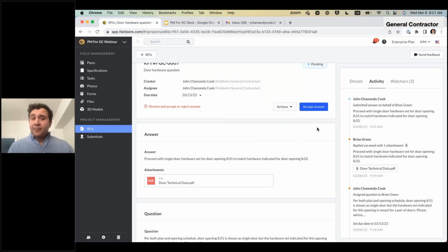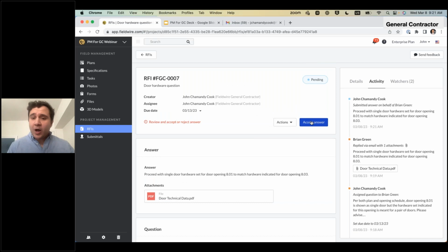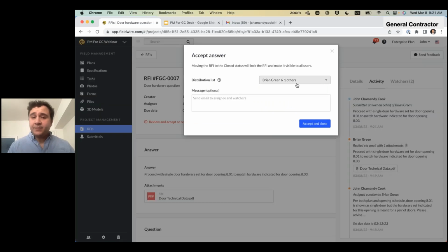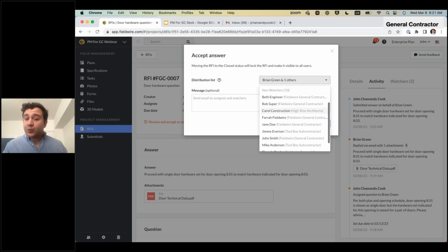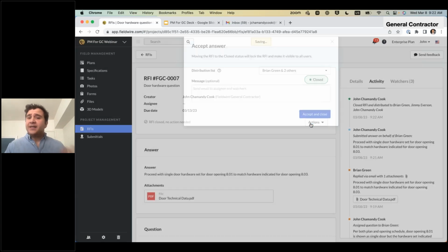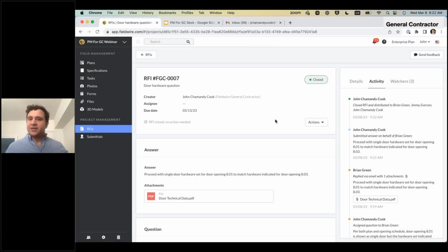In this case, I'm pleased with this answer. I like it. Let's rock and roll. I'm going to go ahead and accept it. When you go to accept, you can decide to add to that distributor list as well. So in this case, Jimmy was the person that asked this question. Let me add him right on there. And now I can accept and close, and everybody on the distributor list is going to receive an email and see the notifications that we've in fact closed out this RFI.